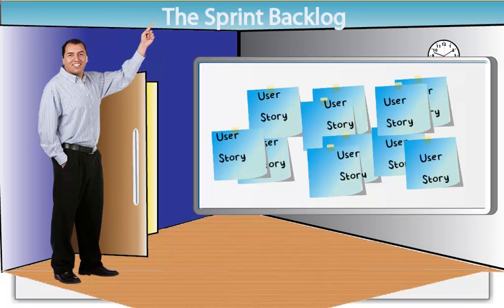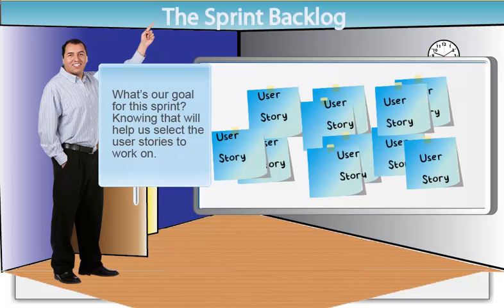During the sprint planning meeting, the project stakeholders review the list of product backlog items presented by the product owner. The team will collectively decide what will get assigned to the current sprint. Often, a sprint will have a specific theme or goal. For instance, for our case study, there might be a sprint theme surrounding the different department needs, around graphic design, around usability, etc.